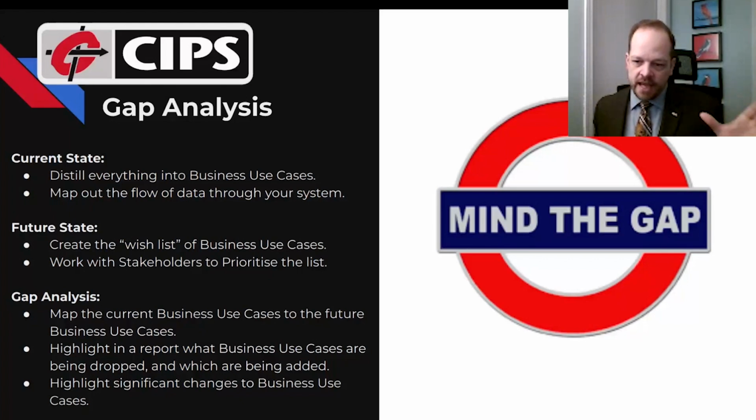Always have your gaps in your gap analysis verified against the business on whether they actually are a gap, or just something that, yeah, just sign off on it. It's fine. If that goes away, it doesn't matter.